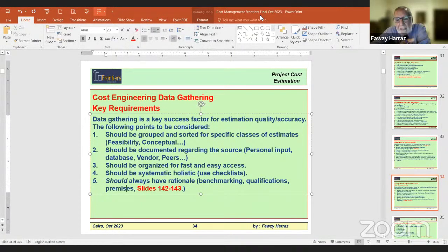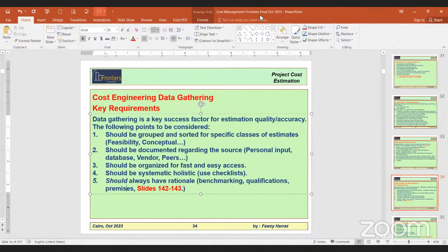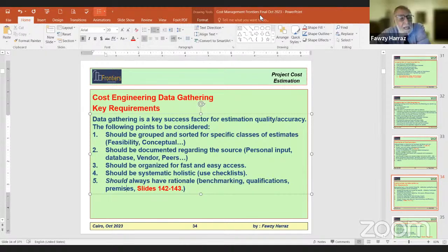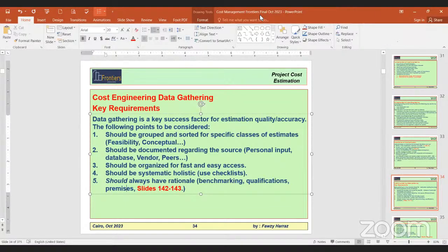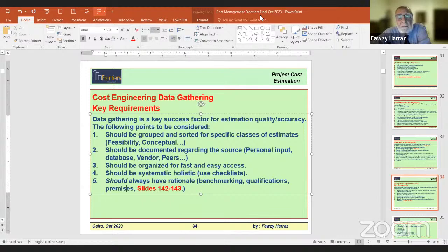If you share it, you benefit the consultant and owner, because there are always these mistakes in the BOQ: missing items and wrong quantities, wrong high or wrong low. If you deal ethically, you need to highlight and share it with the consultant and owner, and they would share it with other bidders to align the commercial quotations. If you want to do it the other way, it's up to you.